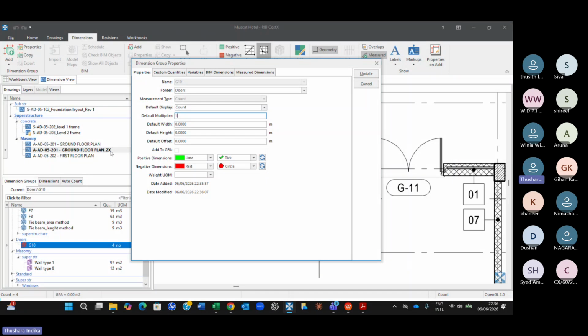That's why I put 2x. Now, you don't have to change the multiplier again here, unless you have a similar drawing. Let's say this is also symmetrical, then you can have that multiplier, both sides, because you measure only one side, and you take this as 2 here, and then you have two drawings. Then only you will get 4. But here only 1, for example.